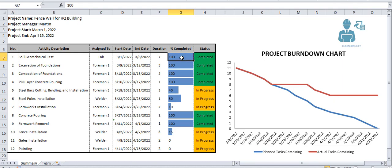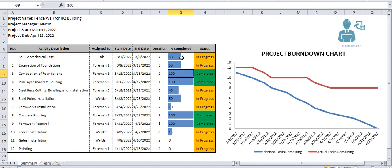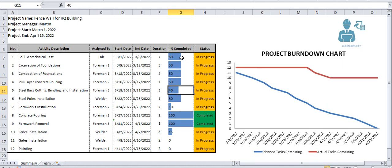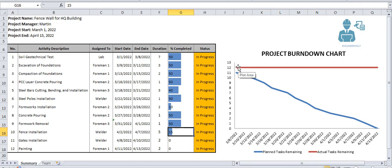You will see the total number of tasks. Let's update this and you can see the number of tasks that we should do is 12. 12 tasks are remaining to be completed. And our today's date is somewhere here, we are at 7th April. We should have only two tasks remaining while we have 12.